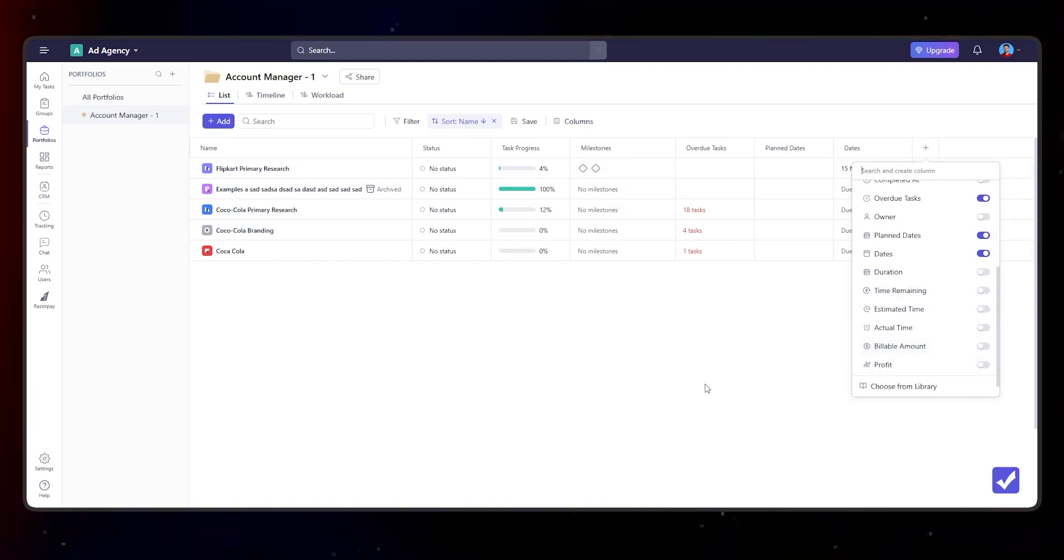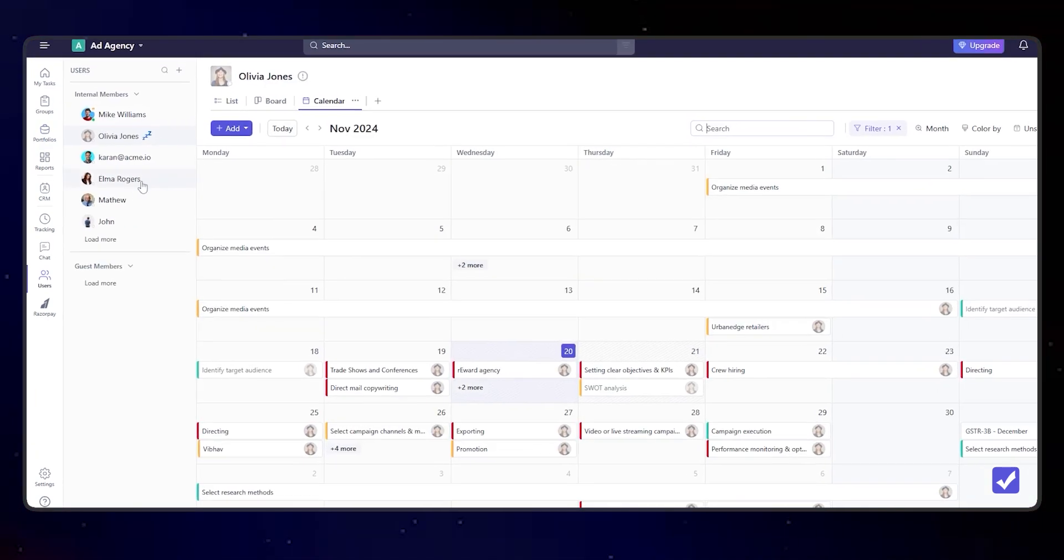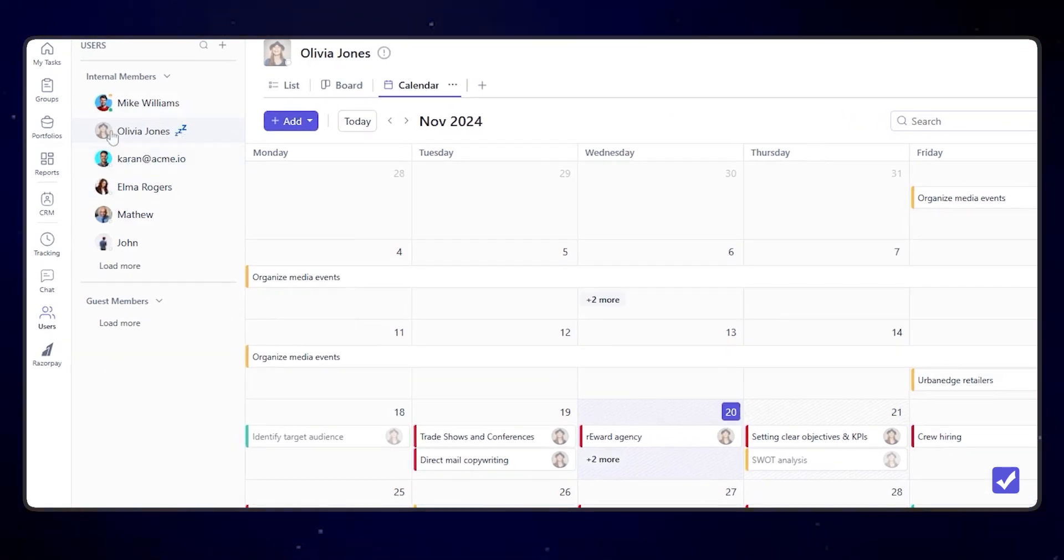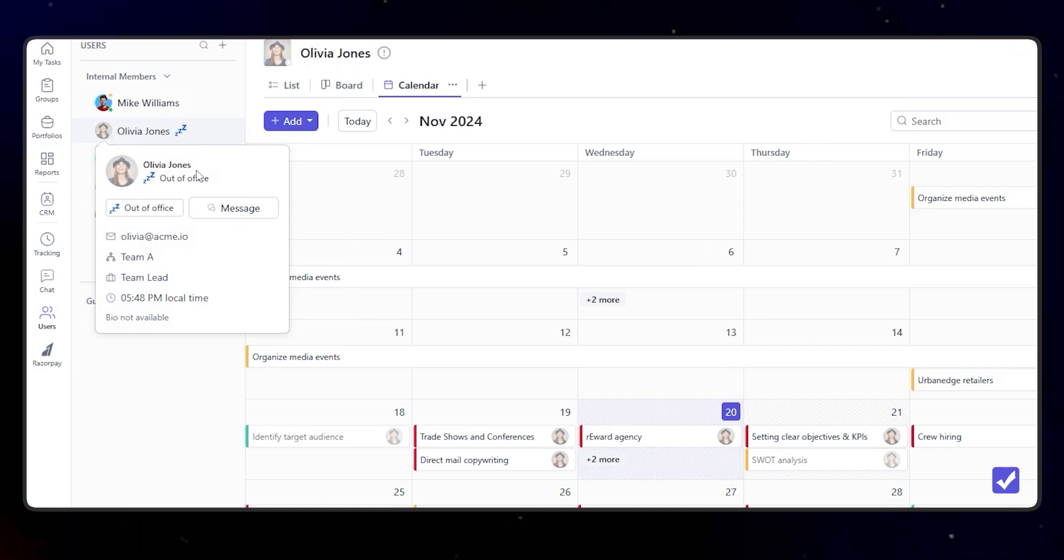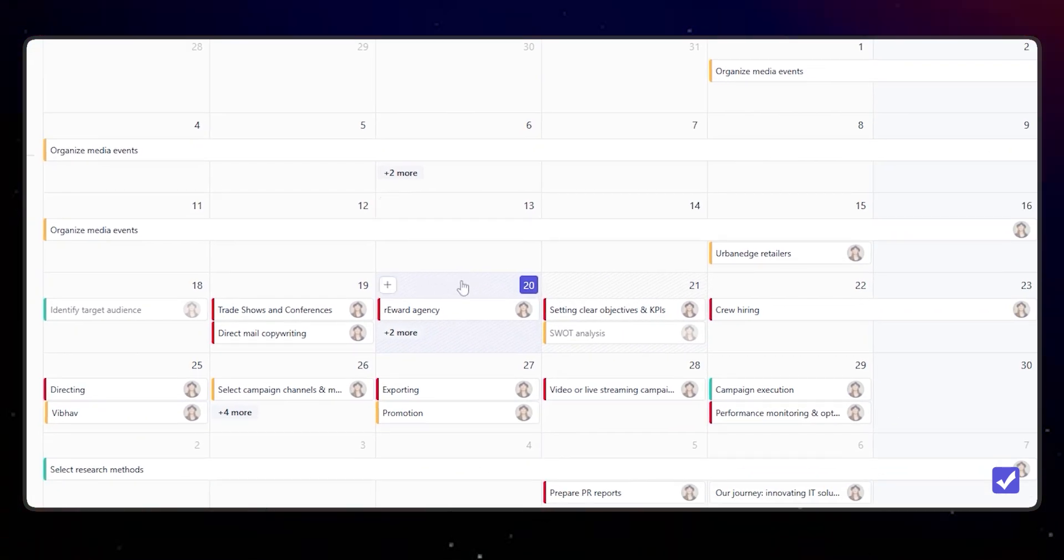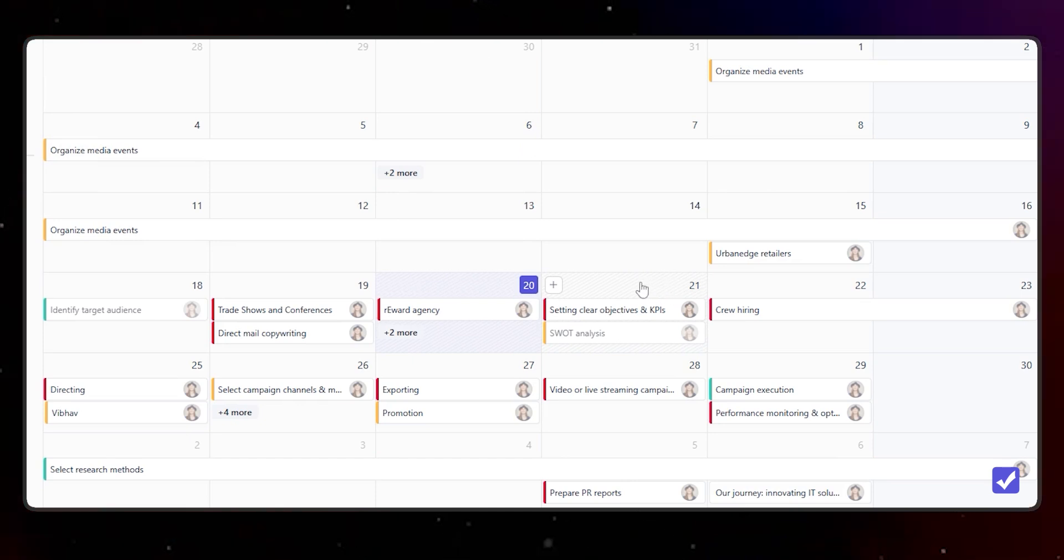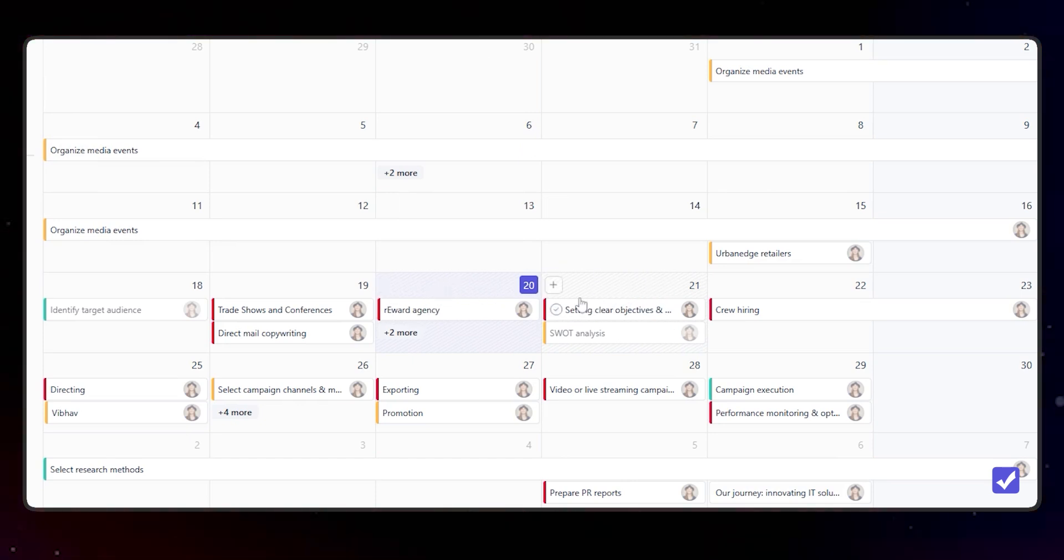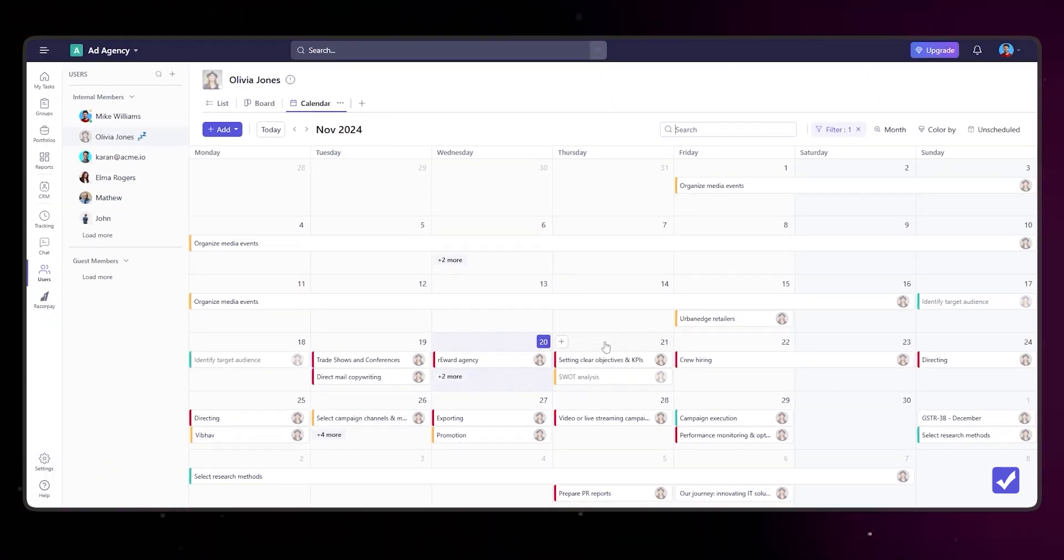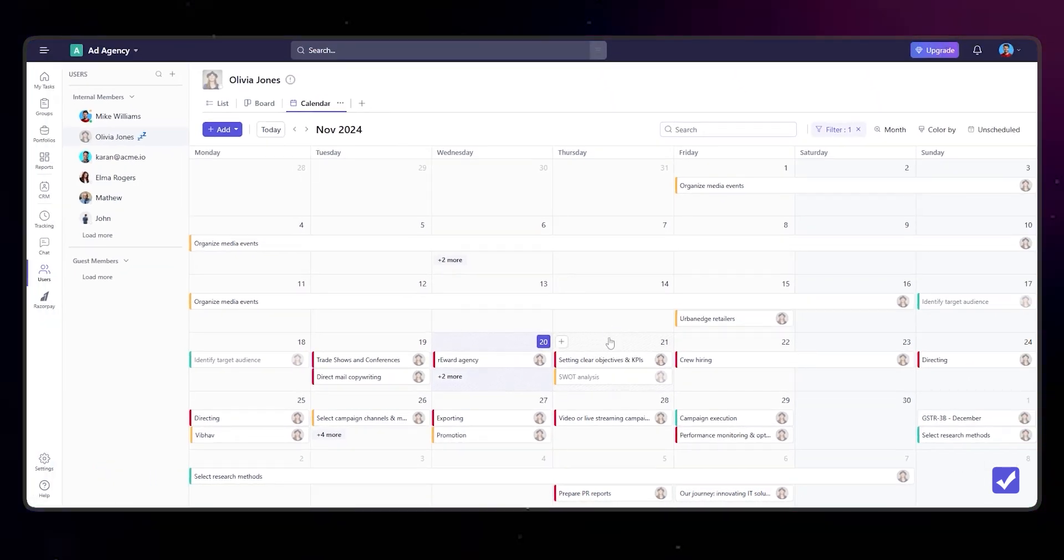We have also introduced a time off option here. As you can see, Olivia is currently on a time off, she's out of office. You can see it is also reflected in the calendar view. These shaded cells reflect that Olivia won't be available on these dates. This out-of-office information is also available in the timeline view and will also be available in the workload view.